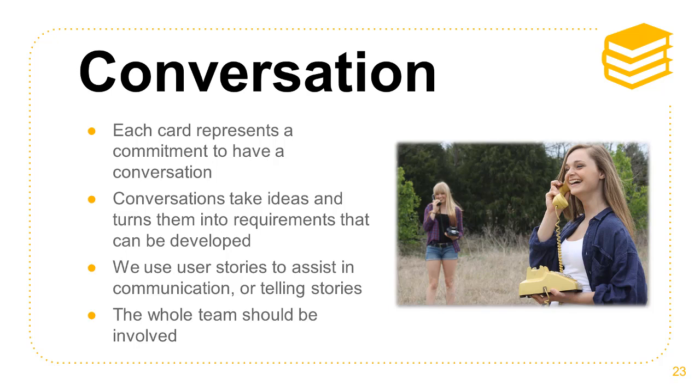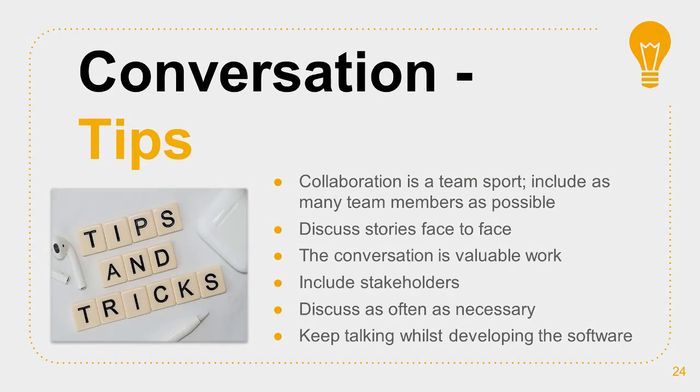As the team begins to work on a user story, they should discuss the story thoroughly, working from an understanding of the user need through to the solution that will be delivered. Instead of the traditional waterfall approach, where business analysts and system analysts would write specifications for their requirements and hand those to the developers, in Agile projects, the team works together to understand the solution, drawing on the skills of each team member. When discussing user stories, it's worth remembering the following tips.